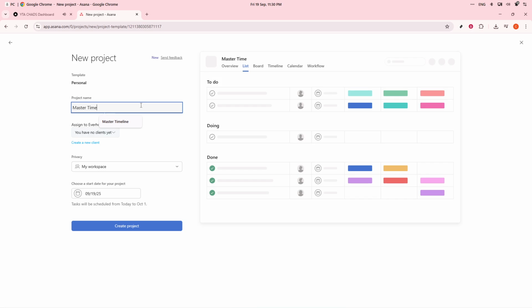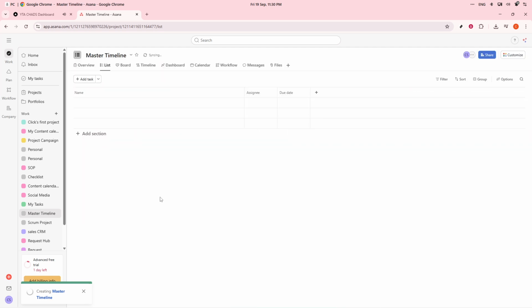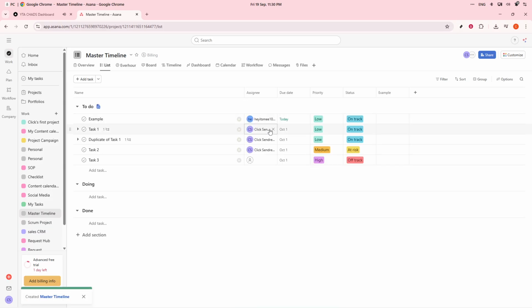Next, consider organizing your project by adding key milestones and deliverables. Try creating sections or columns that categorize major areas such as product launches, marketing campaigns, events, and team initiatives. Under each of these sections, you can add milestones or summary tasks. These should represent the big goals your team is working towards. This categorization allows you to visualize each critical goal and ensure your team is on track to meet them.